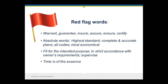You want to stay away from what I call the absolute words — things like 'highest standard of care' and 'complete and accurate.' No set of documents I've ever seen is 100% complete and accurate. 'Highest standard of care' basically elevates the ordinary standard of care to one of perfection. 'Fit for its intended purpose' creates liability for subjective performance and is more applicable to strict liability for manufacturing than for professional services. The standard of care for professional services should be modified with caution. If a client demands a standard of care beyond one consistent with due professional skill and care, it should be measurable and you should receive compensation related to the increased risks.